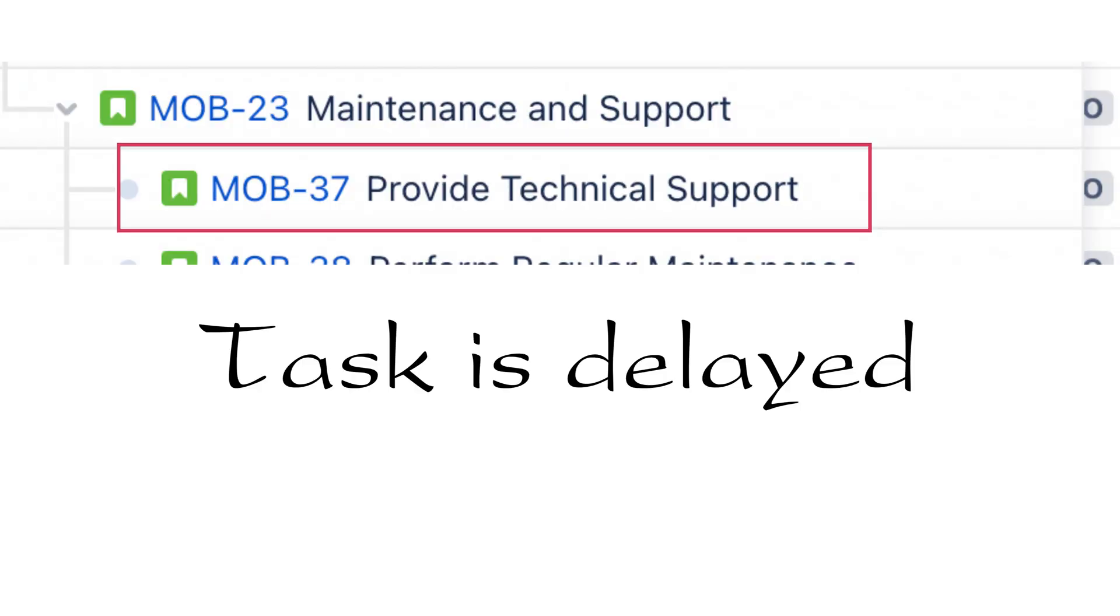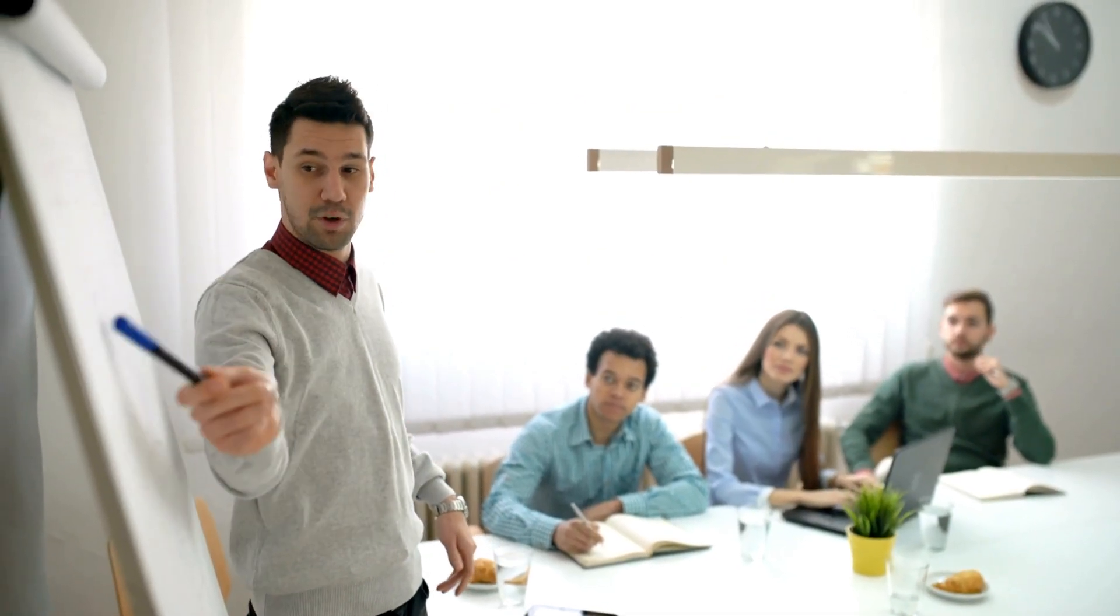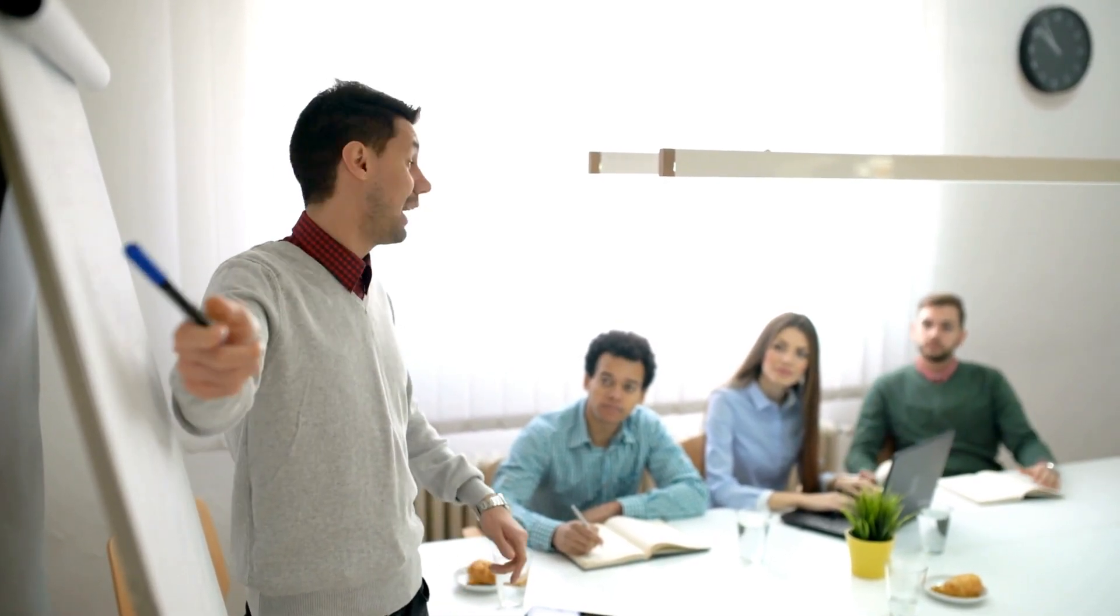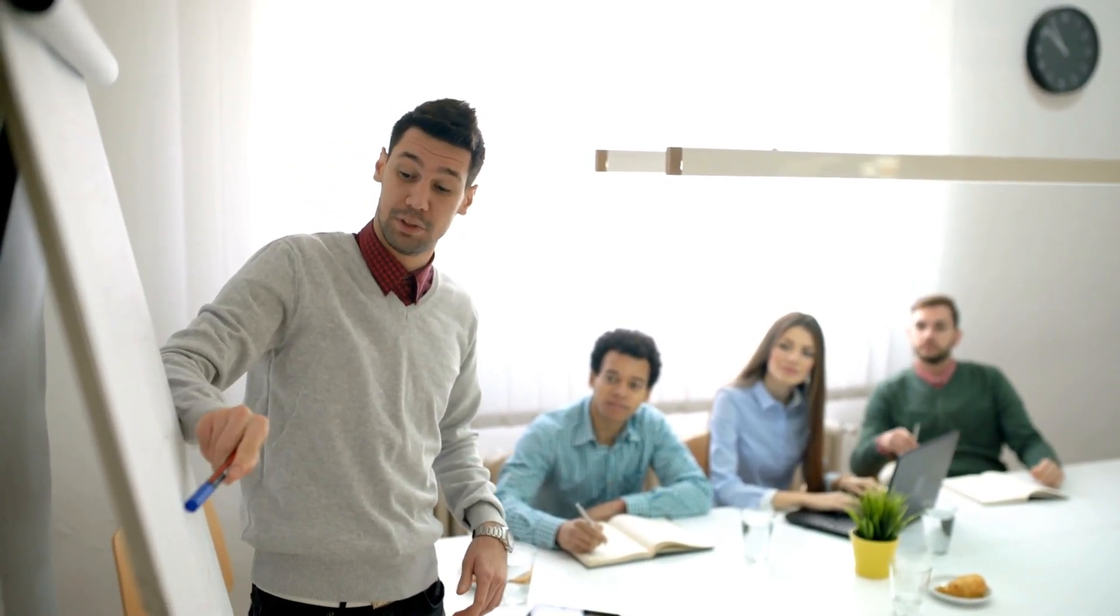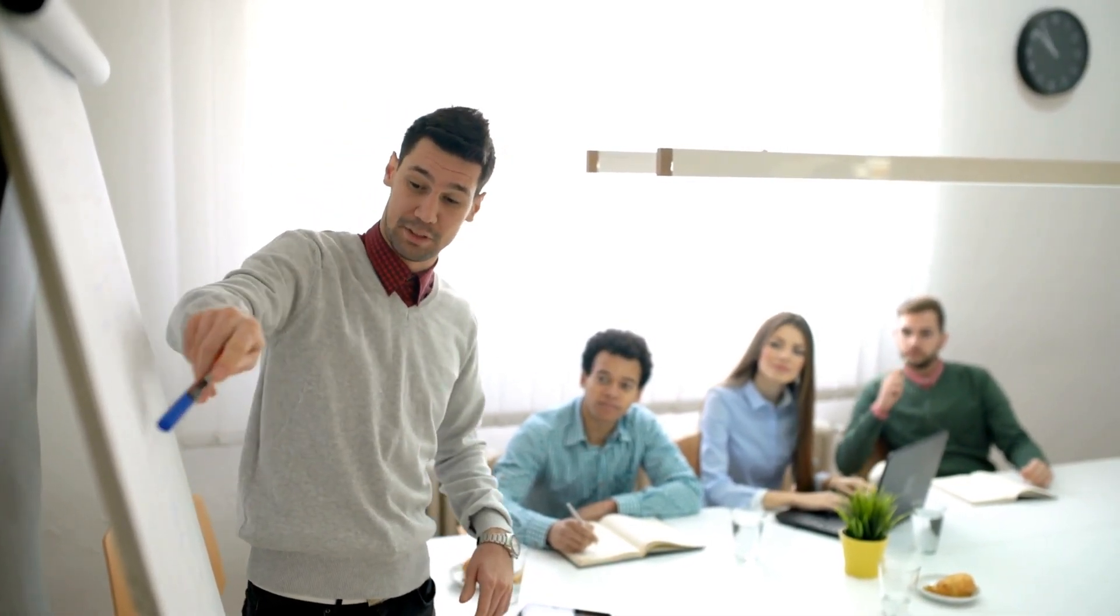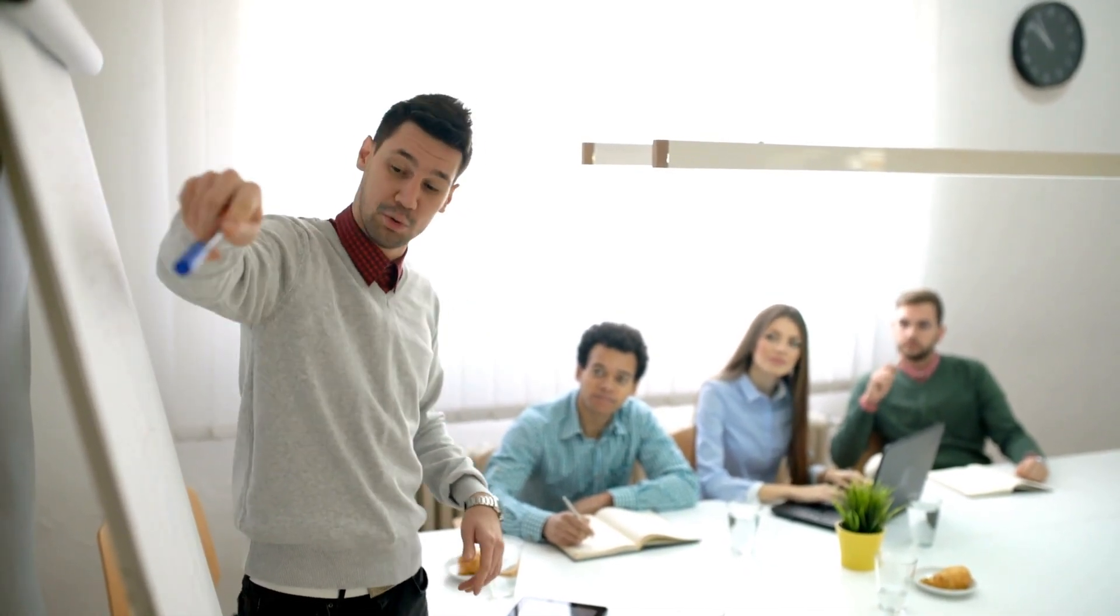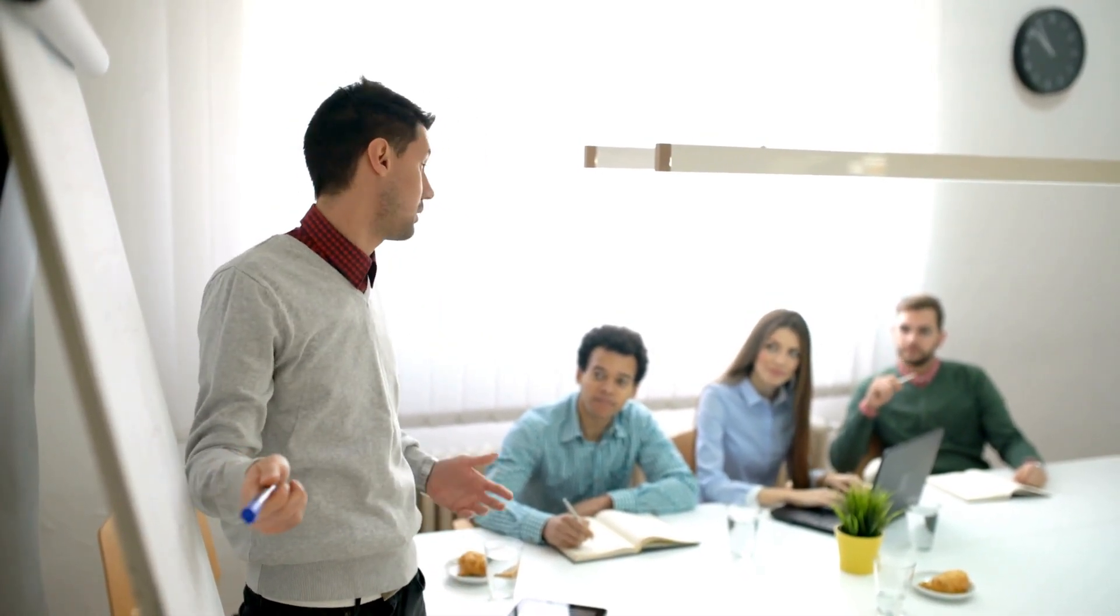If the provide technical support task is delayed, the project manager can use the WBS Gantt Chart to see how that delay affects the overall project schedule. They can then communicate the impact of the delay to stakeholders and adjust the project plan as needed.